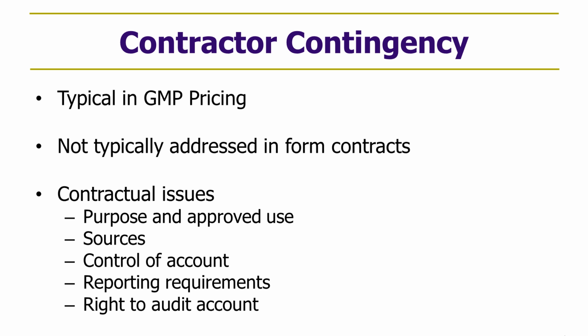And in terms of the contingency, I think this is an issue that uniquely creates interest on the part of the contractor, the owner, and even lenders, because it's an aspect of the overall budget that is undefined at the start, and it's essentially a slush number. That's not meant as a pejorative term, but it's a slush fund beyond what's categorically defined, and then there needs to be definition added to the contract on how it will be treated.